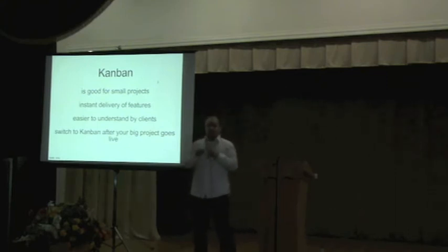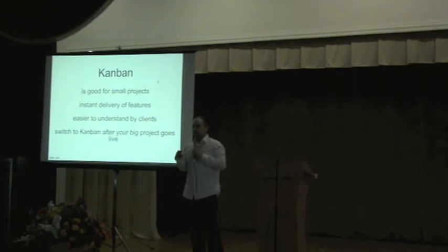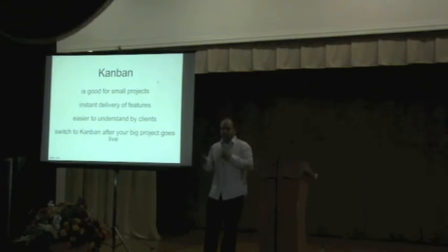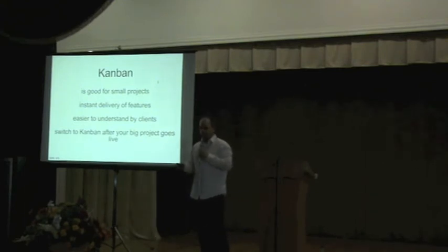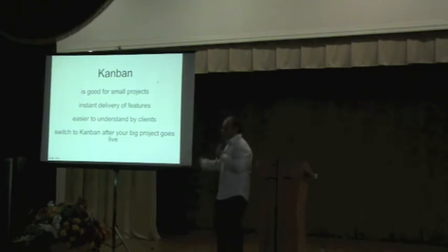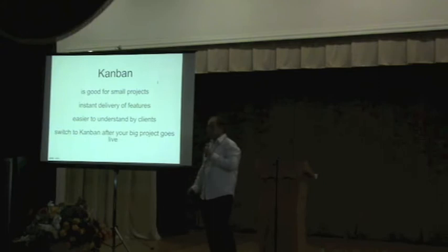If the client cannot give a separate person to manage the project, we suggest that the client hires someone and we point them at this person, who is not part of our team, to avoid conflicts of interest. That must be a representative of the client. So we say, go and hire this independent manager and he will be your representative. That works very well.